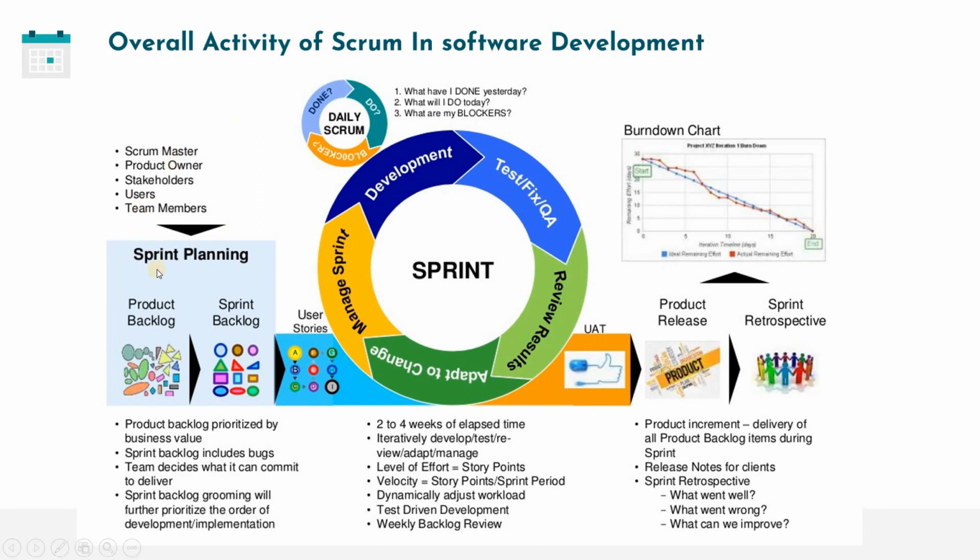So the sprint starts with the sprint planning meeting. When we start the sprint planning, the BA will introduce the product backlog. Product backlog includes several things. It is in a non-arranged way. Then under the sprint planning meeting, the team lead and the QA lead will collaborate with team members, arrange the sprint backlog and take the sprint backlog from the product backlog.